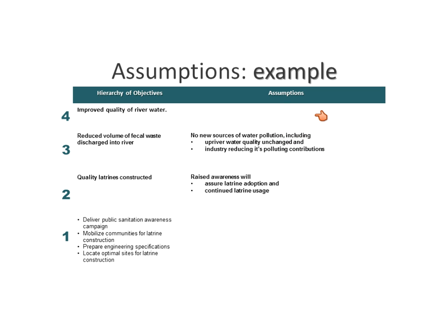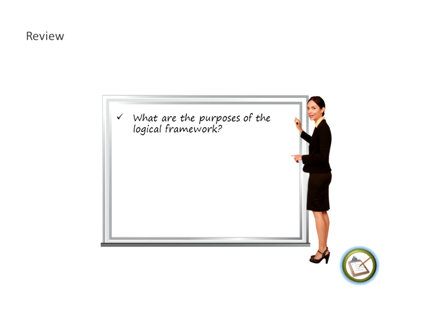They must say, okay, what happens if the upstream villages or factories continue to pollute? That's going to be a problem. So maybe then the project has to be expanded or changed in order to include those other villages. So those are examples of how important the assumptions are to the actual management.